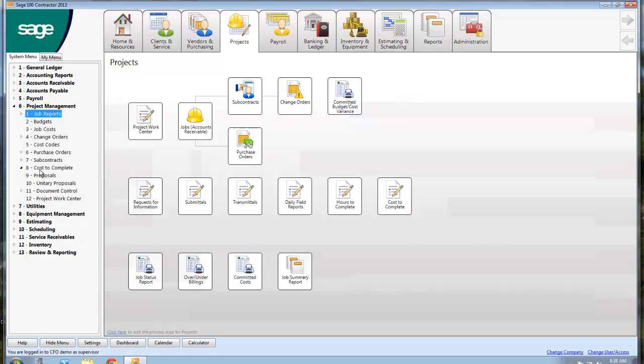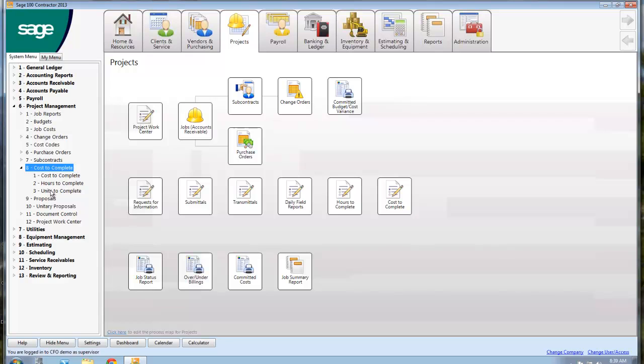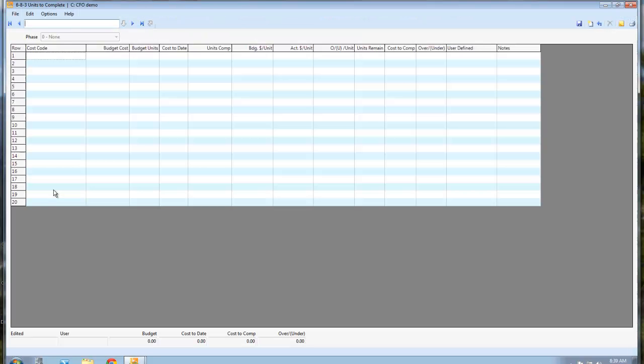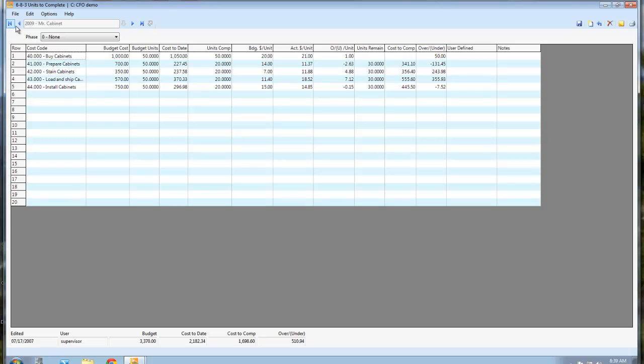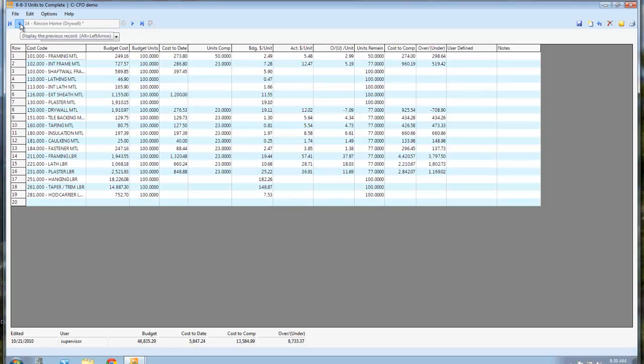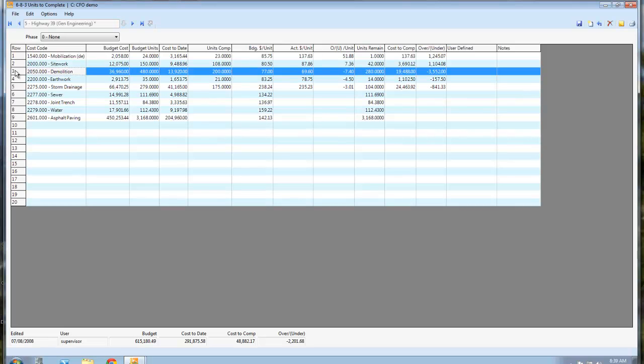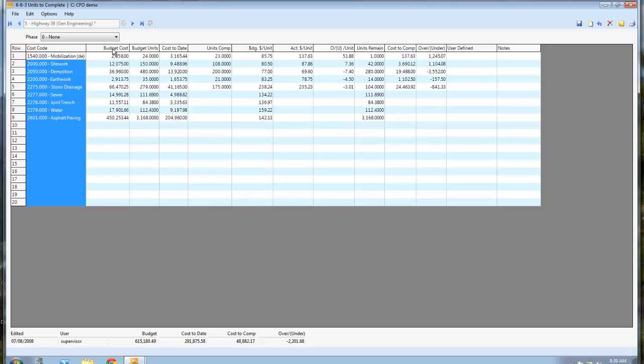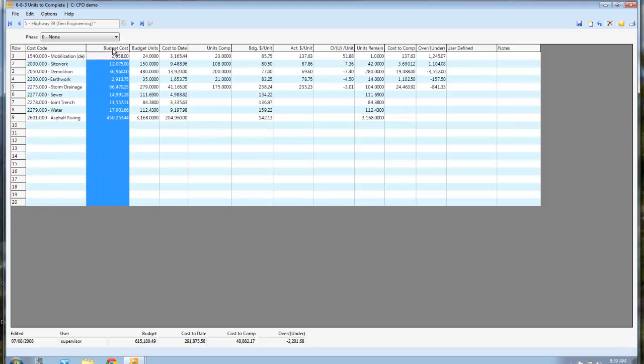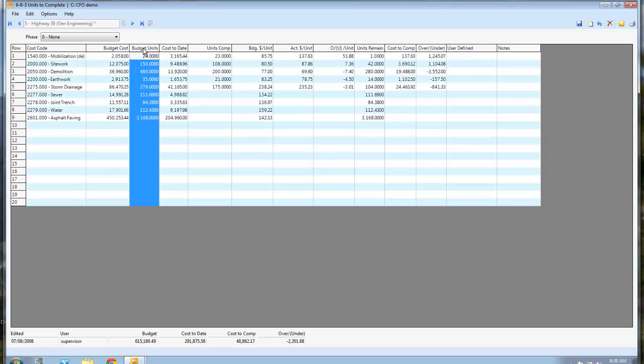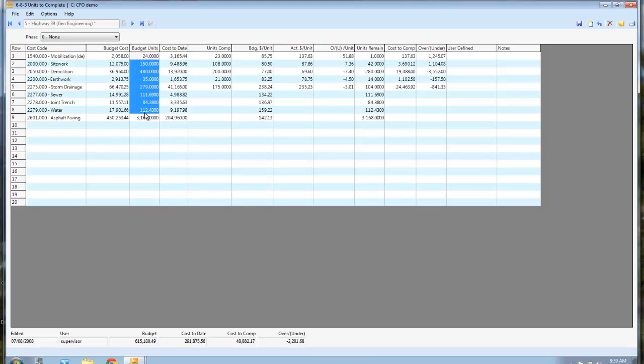So now let's get into the good stuff. My background is heavy highway, by the way, and concrete paving. So one of my favorite reports is this one here. Let me just go find my highway job. So we need a couple things from you to get this thing to work. And I think if you don't remember exactly what estimate system you're using, but I'll think of it in a second. We would want you to be able to give us by project, by task code or cost code, the budget including labor, equipment, materials, how many units there are to perform. So it could be—we don't care what the unit type is. It could be square feet, square yards, cubic yards, eaches, whatever. As long as it's measurable and you guys in the field can measure it.